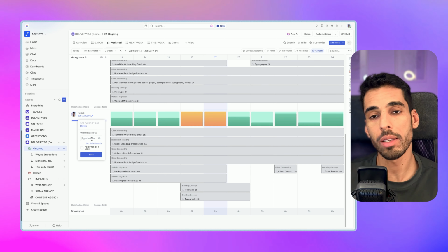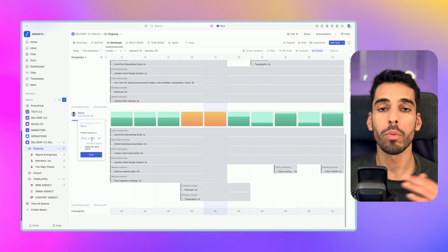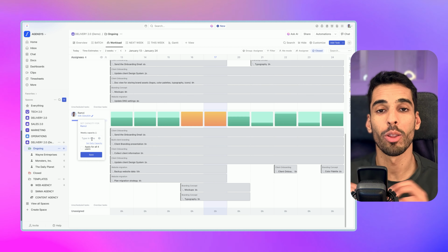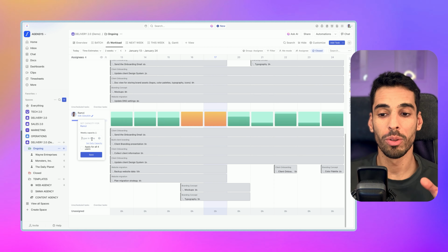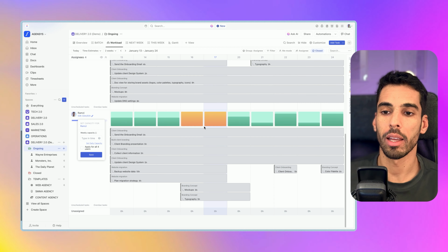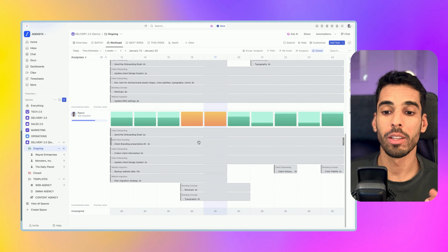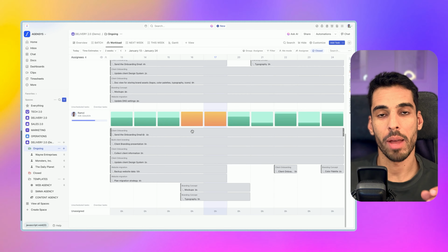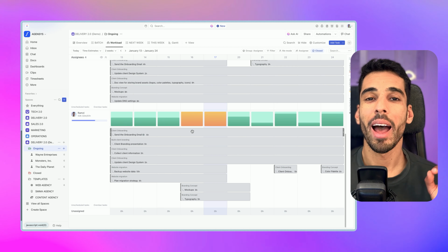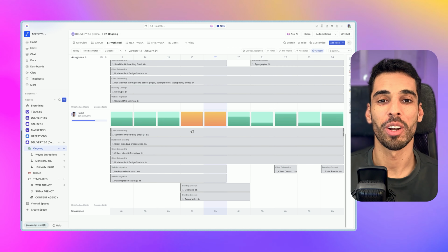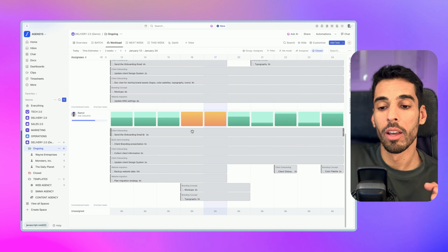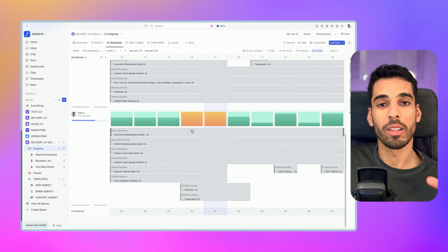You also have to take into account their holidays. One way I advise you to do this is to create a list with everyone's holidays in ClickUp with their start and end date, the person as an assignee, and the holidays as a time estimate. If you do this, you will actually bring that holiday as a virtual task into ClickUp and into their workload view, and you will be able to take that into account in their capacity. That's one way to handle holidays, and that's how I advise my clients to do it. Now, I've heard ClickUp might bring a holidays feature and let you set up everyone's holidays, PTO and availability. So that might change in the future, but for now, that's one way to do it.